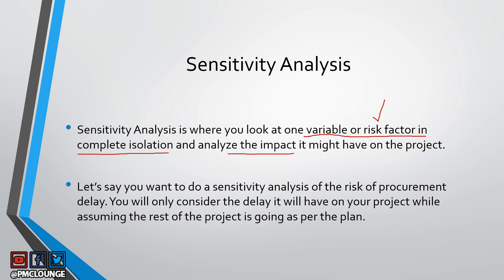Let's take an example. One of the risks in your project could be procurement delay. If you've worked on construction projects or IT infrastructure projects where you need to procure hardware, you'll agree that procurement delay is one of the most common risks for any project requiring procurement. When doing sensitivity analysis of procurement delay, you only consider the delay that procurement will have on your project while assuming all other risk factors are constant or won't materialize — you look at it in complete isolation.